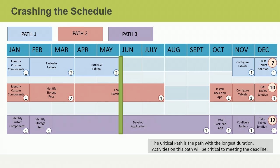Think of this scenario in the context of crashing. If today is June 1st, how can you best utilize this technique to finish your project a month ahead of time? If you suggested adding resources to the develop application activity, that is the best answer. It only makes sense to crash activities that are on the critical path — that is the only way to compress your overall schedule. Also, the sooner you address the issue, the better. The develop application activity is the only activity available to crash since it is occurring right now. If you wait too long, the opportunity may slip away.